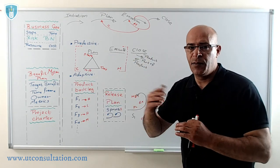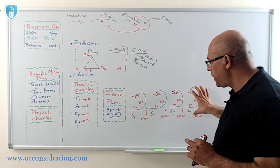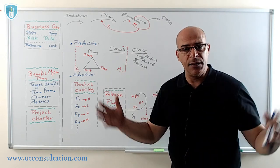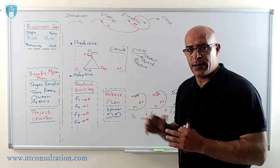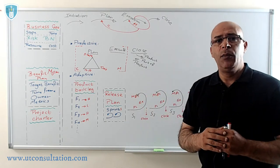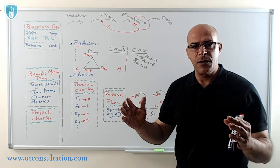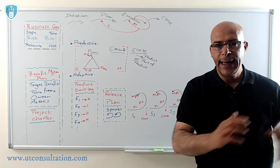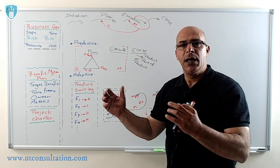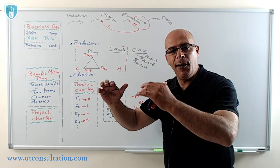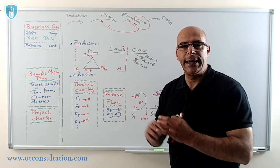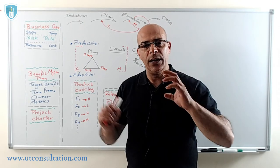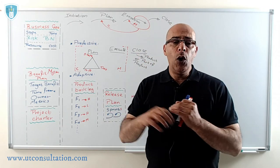Comparing with the predictive lifecycle: in predictive, closing means delivering a complete product. In adaptive, we deliver a product or part of the product or a working product. Here 'closing' means ready to go — it may include integration so it can be used. Each sprint produces a working product that can be used, but it doesn't necessarily deliver business value by itself. A complete release, however, must deliver business value. For a large product, you may have more than one release — release 1, release 2, release 3. The same way, the most important features will be in release 1, then release 2, then release 3.